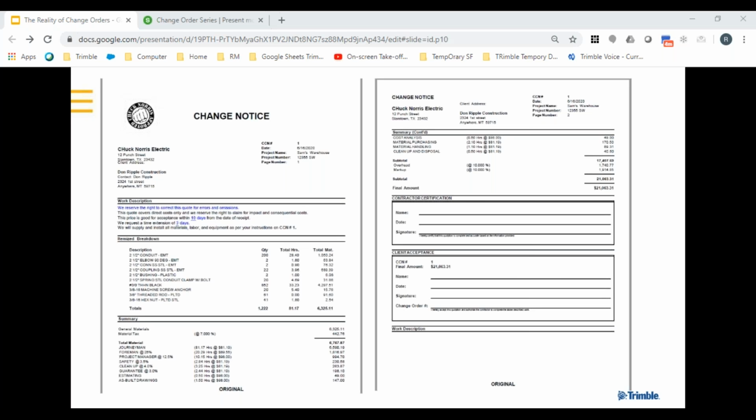What I would tell you not to do is go in there and start playing around with NECA's labor. If it says it's, you know, 28.4 man hours there, I wouldn't go playing with that number, falsifying that value. That is your book standard. If you do need to make a concession with a client, you can always make a concession with a discount or an add to those units, but I would not doctor those units up, because that's what's going to validate your world.